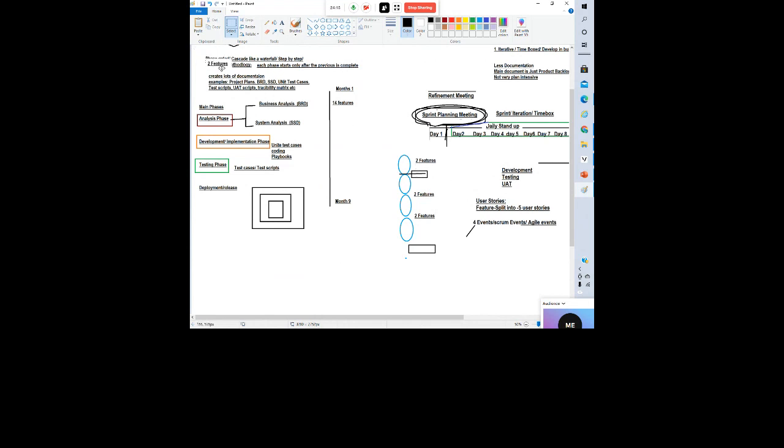But in waterfall, the customer cannot see anything until everything is done. After that, to fix it if it is not what they want will take much more time and resources. Maybe they may need another 6 months to work on it. But here, if they build two features and the customer doesn't like it, just one sprint is lost, and they can rework and build three features in the next sprint. So that is the comparative advantage.